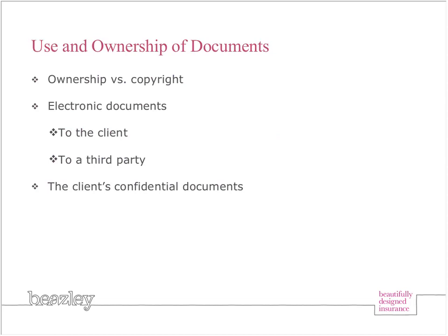If you're going to transfer ownership, you want to make sure that you get paid for services rendered before you transfer that ownership. You want to limit the client's use of your work product to the use and occupancy and maintenance of the project for which they were created. And you want to require the client to indemnify you if they use your work product without your authorization or involvement.